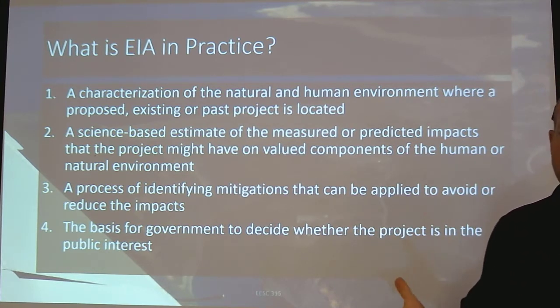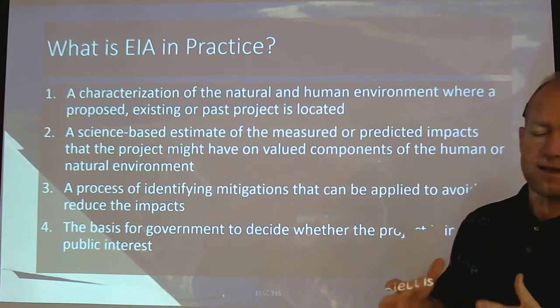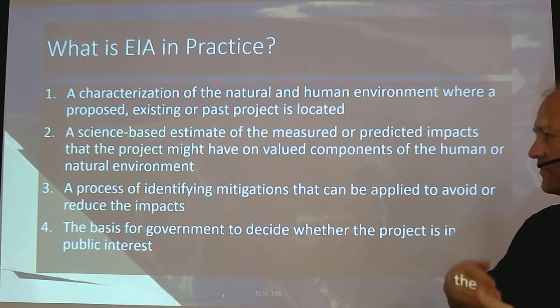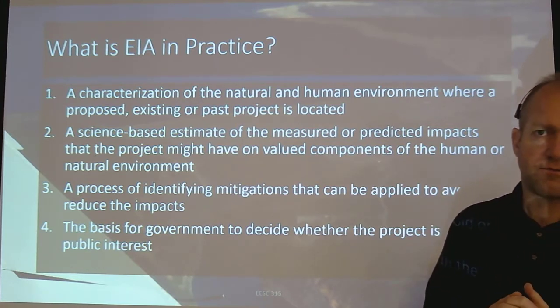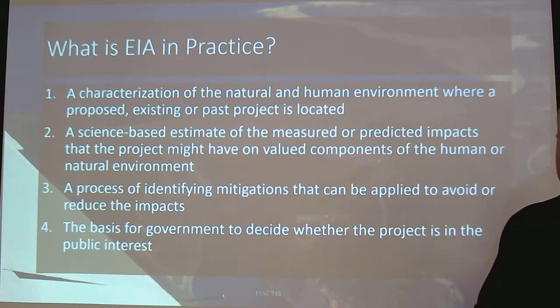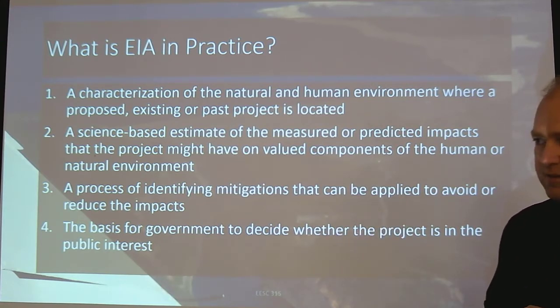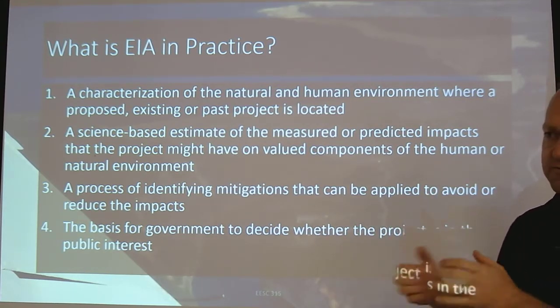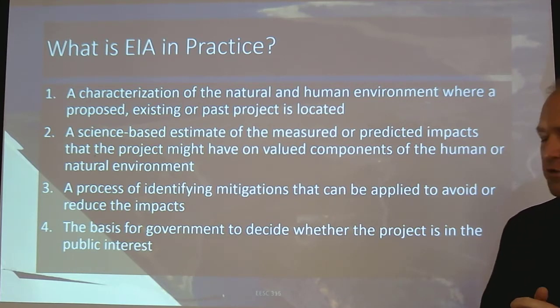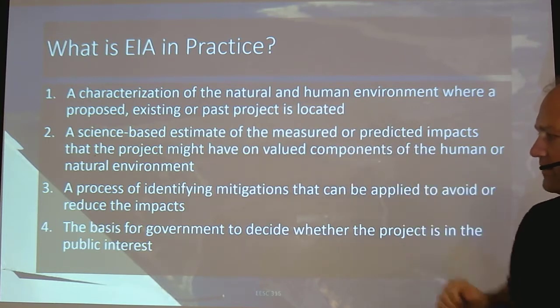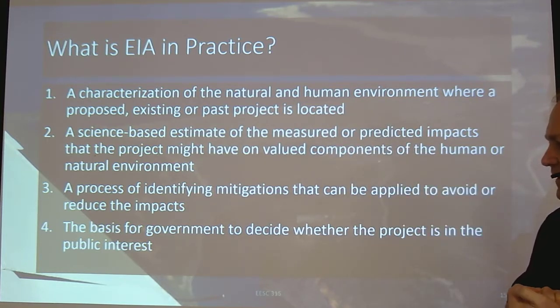Now there's a discharge to the lake that has a low level of phosphorus so that it doesn't affect Okanagan Lake. And so that assessment would have been iterative, and the final assessment would have considered that mitigation before the sewage treatment plant was built. And sure enough, the plant was built with phosphorus removal, and that would have been a result of this iterative process.